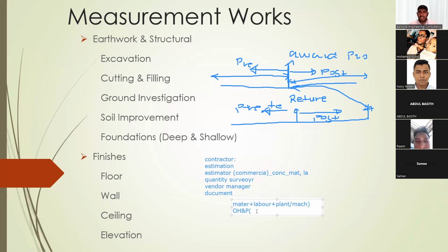So as I mentioned here, the quantity surveyor does the estimation and quantity take-off. Then he gives it to the estimator to put the price, and overhead and profit are decided by the parties. As I mentioned earlier, with the interference of the quantity surveyor, it is put together, the tender is priced, and submitted to the consultant. Once the consultant has received it, you know what the consultant QS is doing in that job.